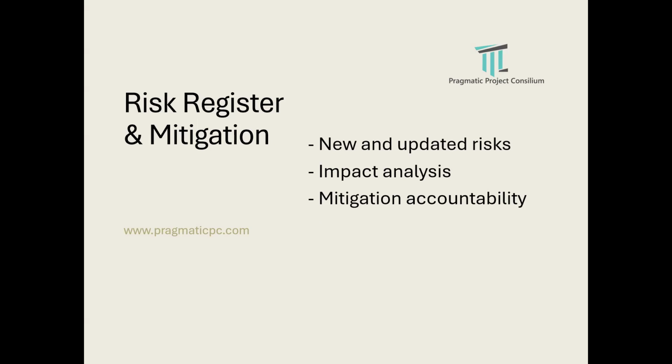Risk register and mitigation. This risk register has now become a very important document in progress reporting. It should not be a standalone document. It has to be integrated with the monthly progress report, it has to be integrated with the schedule, and it has to be reflected in the other departmental deliverables. What are the major mitigation efforts we are taking to avoid the risk, or the risk that has already occurred? That has to be recorded. The parties accountable also have to be recorded.